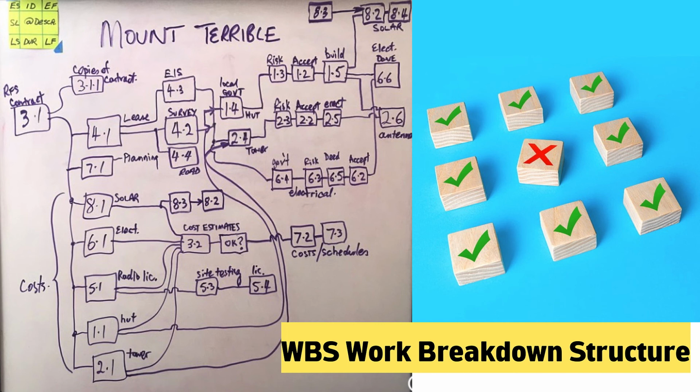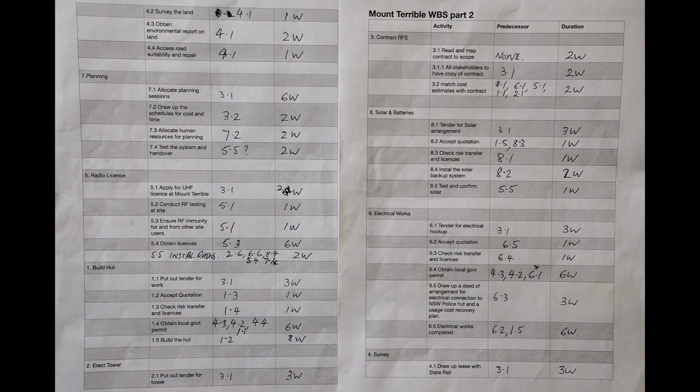Before the project can be put into Omniplan easily, it really needs to have some work done on a whiteboard, preferably, to find the predecessor and successor activities and time durations. These time durations and predecessor activities are added to the WBS worksheet number 2.